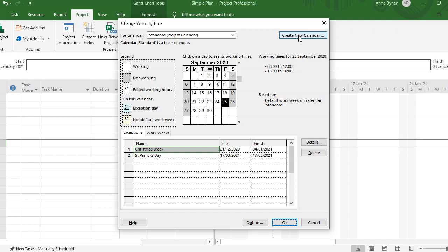So number 2, you either make the change in your own calendar, or else you create a new calendar. So you make the change in the standard calendar, or else you create a new calendar. And if I ask you to make a new calendar, I'll give you the name of the calendar I want you to make. If you are asked to create a new calendar, it is important that you select the calendar that you've just created, because there's no point in making a calendar called Lucerne and then going back and putting the information into the standard calendar.